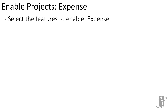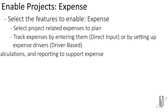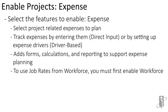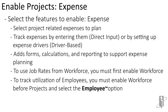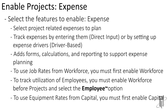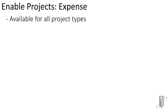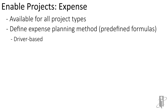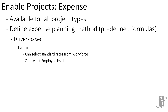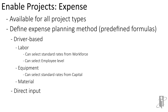Depending on what you turn on — direct input or driver-based — you will get different forms, different calculations, and different reporting to support expense planning. If you have other frameworks such as workforce, you have to turn on job rates in workforce to get them to feed across to projects. If you want to track employee utilization, you go into workforce, select the employee option for employee-level planning, and that will also feed back and forth with projects. You might also want to tie this into the capital module to use equipment rates — you have to first enable the capital module, and then that feeds over to projects. Within expense projects planning, there are pre-built calculations — for instance, if you put in a labor rate and number of people, it will calculate the total, pulling from workforce. Or if you're calculating equipment costs and rates, it could pull that from capital. Maybe you're looking at material costs or directly inputting data — all of that is done through the expense portion of the Projects Framework.